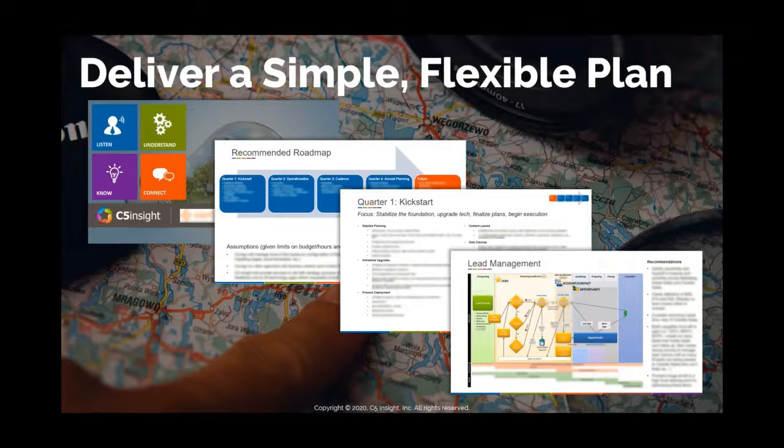And then remember, when you deliver your plan, for us, we used to, and occasionally we still have to, deliver big Word documents with lots of details in the plan. Still not waterfall, but a lot more detail. If you're a big, complex organization, you may still need to do that. But that's generally really big, really complex. For most organizations of most size now, we're moving with agility. You don't want that much detail in there because by the time you finish the first 1 or 2 phases, what you're going to find is you've learned something new and the plan needs to change. And do you really want to rewrite all of that? So something like PowerPoint is more than up to the task for the high level plan.